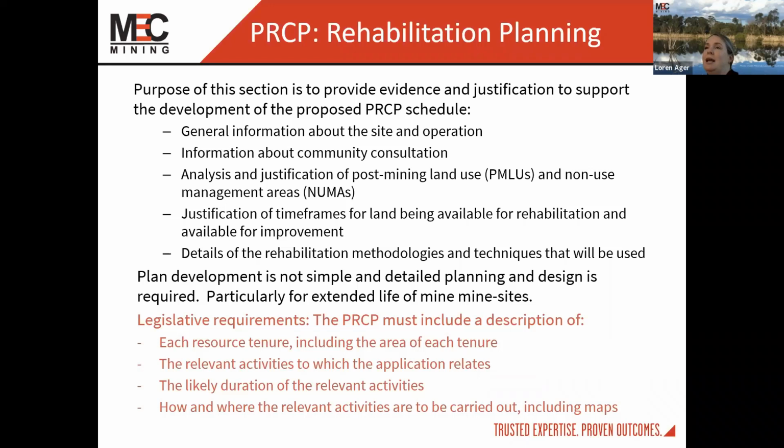Where this happens, the department or the authority requires concept designs and adequate material required to fulfill those concept designs as a bit of a focus. So it shouldn't deter you from producing a PRCP, it shouldn't deter you from including some information, but there just needs to be a note made that once decisions have been made that have changed in the planning process, a new submission or a resubmission of your PRCP is required. There are also legislation requirements associated with this section.